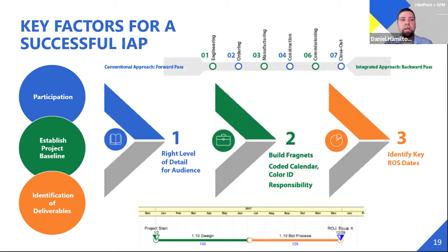At the end of the interactive planning, we want to ensure that the schedule is completely workable and the overall timeline can be used to establish the schedule baseline. And then lastly, we can use the interactive planning to quantify against any substantial changes that may require a schedule rebaseline.